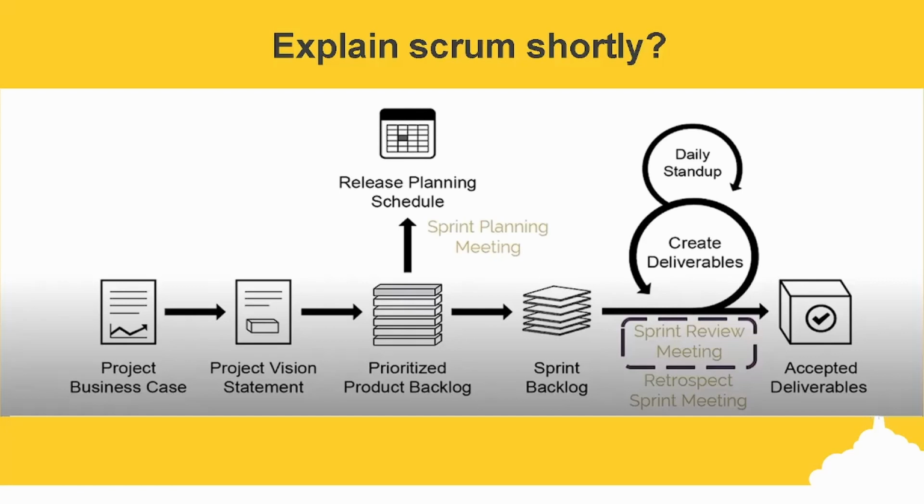Each sprint begins with a sprint planning meeting during which high priority user stories are considered for inclusion in the sprint. A sprint generally lasts between 1 to 4 weeks and involves the Scrum team working to create potentially shippable deliverables, a product increment. During the sprint, short, highly focused daily stand-up meetings are conducted where team members discuss daily progress. Towards the end of the sprint, a sprint review meeting is held during which the product owner and relevant stakeholders are provided a demonstration of the deliverables.